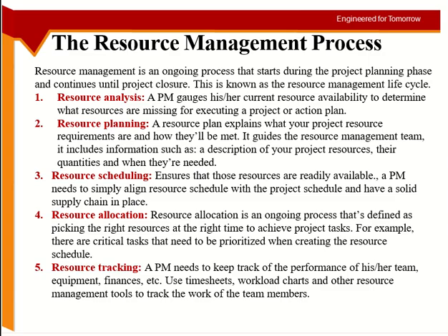When you have a project, you first look at your capacities. For each resource, how much of each type do I have, and what will I need for the project, and you identify the gaps. Then you start preparing your plan. In the plan you note down what you actually need for the project and from where you will get it. You already saw in the first step how much of each resource you have. If you can fulfill it from your store, you will. If you cannot, then you have to arrange it from somewhere, right?